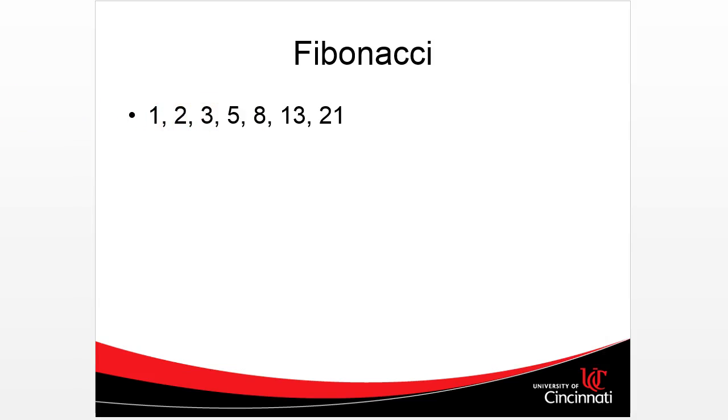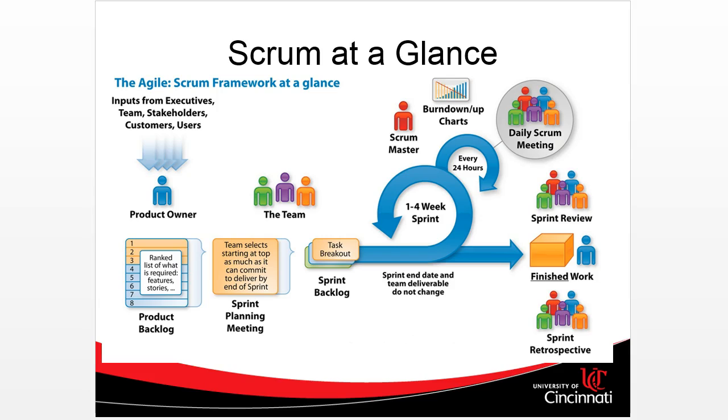Now, how are we going to know how difficult a project is? Remember, the Fibonacci number is not a measure of time, it's just relative difficulty. One Scrum team's 5 is not the same as another Scrum team's 5. It's relative. It's like currency, like pesos. 10 pesos is not the same as $10. $10 is not the same as 10 pounds. It's relative to its context, where it is used.